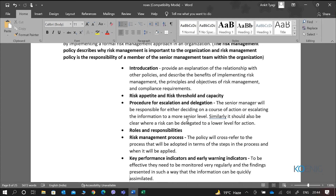The policy also includes risk appetite, risk threshold, and risk capacity. Appetite is the willingness of the organization to take risk — say $10,000 is the appetite. Threshold is the permissible amount of deviation from the appetite, so $10,000 plus or minus 10%. Capacity is the maximum amount of risk that I can take — if my project risk goes beyond my capacity, I can still decide to cancel the project. Tolerances and capacities are usually combined to understand overall risk exposure.